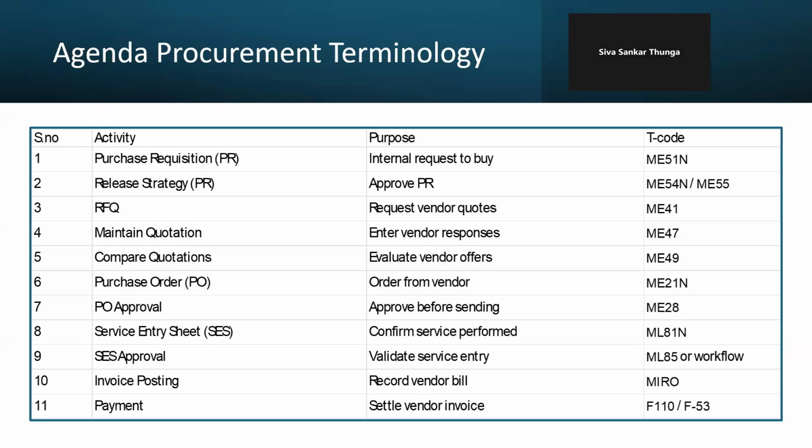Then the department manager will go through this purchase requisition and approve it. If he says okay, he will approve it. If it is not okay, he will reject it and put a comment saying to reduce the quantity or increase the quantity, as this may not suffice. So every purchase requisition will undergo an approval process, and that approval will be done by the department manager,